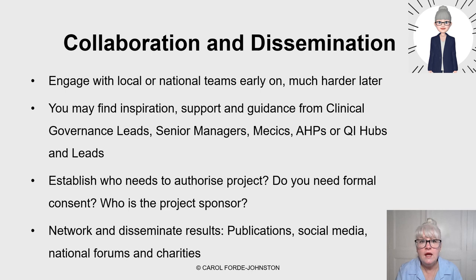With collaboration, you need to find out who needs to authorise the project. You cannot just go into an area and start giving staff questionnaires without going through, because you're taking staff potentially away from the care that they're giving to patients. So there has to be an element of authorization, and similarly with anything to do with patients, you'll need authorization. Do you need a formal consent from a staff member or from the patient? And who is the project sponsor? So it might be the exec team, it could be research and development leads.